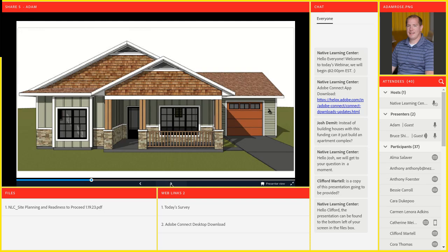So they had done some preliminary sewer capacity studies. So early on in our process, we worked with the city's consultant to make sure that they included our site in their update of their capacity studies, so we knew how large a pumping station we needed to put in. And so that was one of the things that drove the annexation.